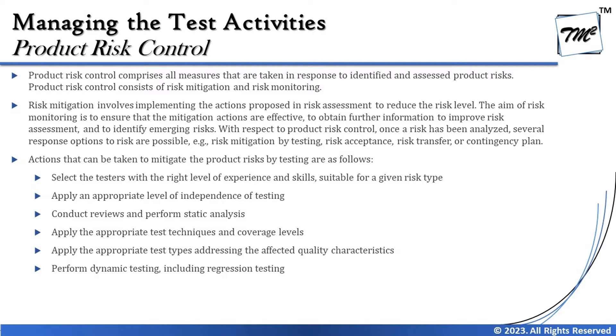With respect to product risk control, once risk has been analyzed, several response options are possible: risk mitigation by testing, risk acceptance, risk transfer, or contingency plan. Mitigation means you have action items and can act on them. Acceptance means you understand the risk but cannot do anything about it — like an act of God such as thunder or a severe storm. You accept it because there is no way to mitigate it.